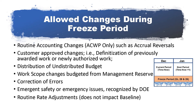Often, adjustments to direct and indirect rates are made which impact previously recorded and/or current period actual costs. Adjustments resulting from changes to prior periods are recorded in the current period column of Formats 1 and 2, and explained in Format 5. Like routine accounting changes, rate adjustments only impact current period ACWP. Freeze period and prior period budgets, like BCWS and BCWP, are never impacted by routine rate adjustments.